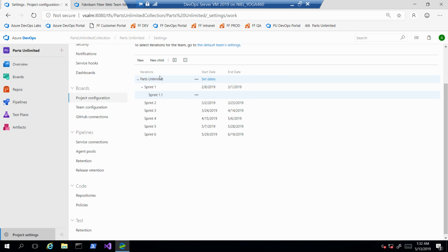You can see this is now a sub-item of that kind of stuff. So how I structure this is pretty much up to me, but as with anything, keep it simple. And it is a huge anti-pattern to have 2 or 3 different teams inside a team project following different sprint cycles. You don't want to do that. That causes headaches like nothing before. Anyway, that's your sprint.